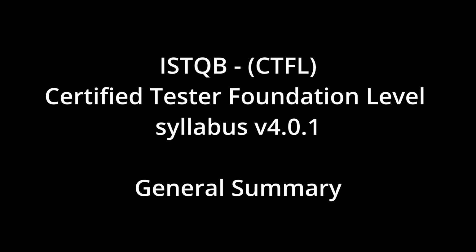Okay. Once you have your test cases designed and ready, how do you decide which ones to run first, especially if you have limited time? That's test case prioritization, and it's crucial for maximizing the value of your testing time. There are several common strategies. Risk-based prioritization is very common. You execute the test cases that cover the highest product risks first to find the potentially most damaging defects early.